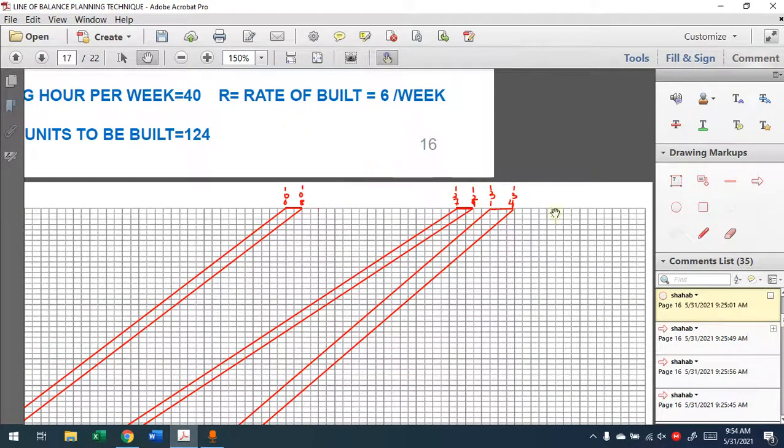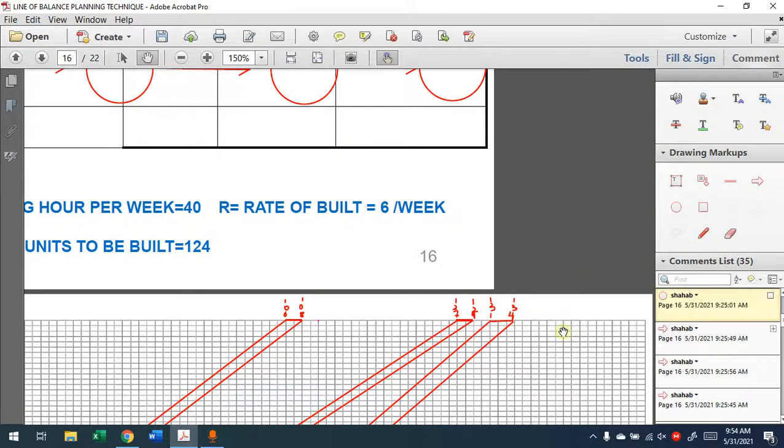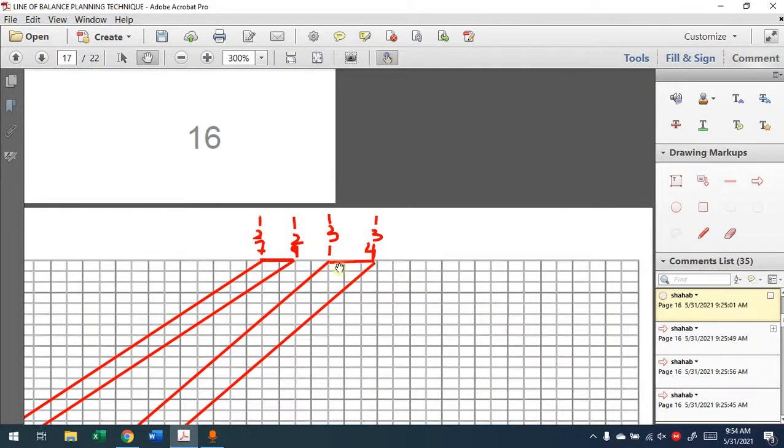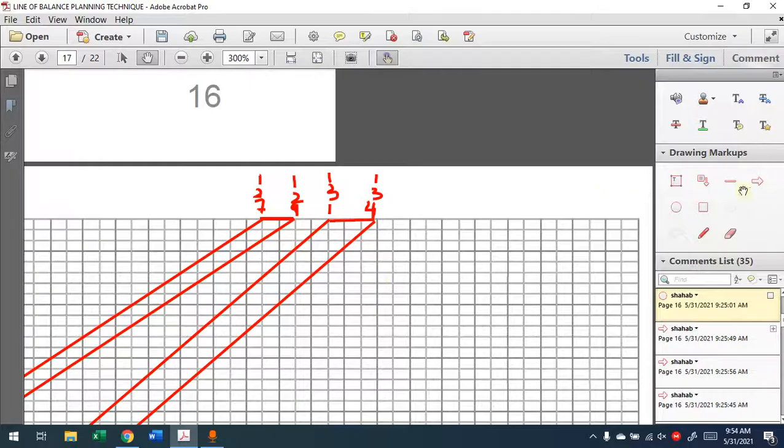The operation is 2 days, and the difference between the lines is 87. Where do we start? We start from the top this time. Why? Because I know the natural rate is higher than the previous one. I'll leave a 2 day buffer, so 134 becomes 136. This is the start. The duration of the activity is 2 days, so this is the beginning of the line, and we draw the line starting from this point.